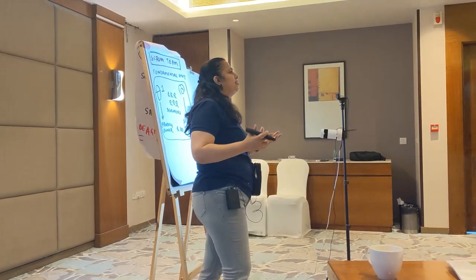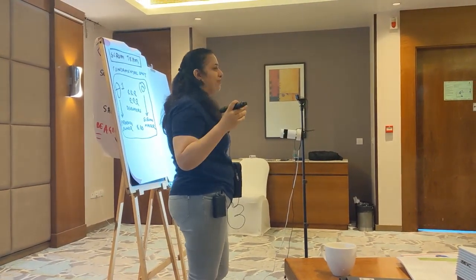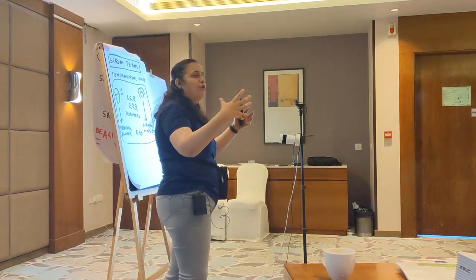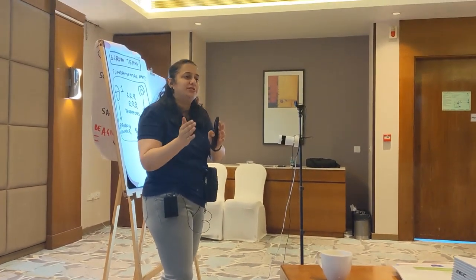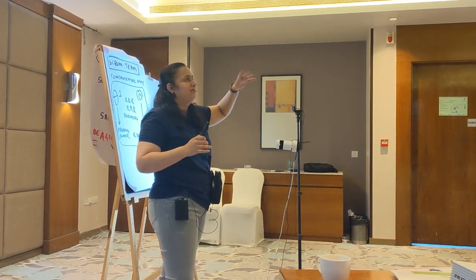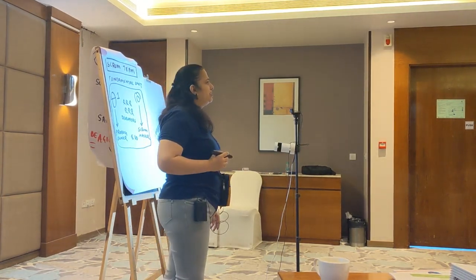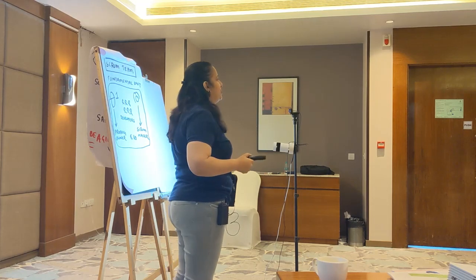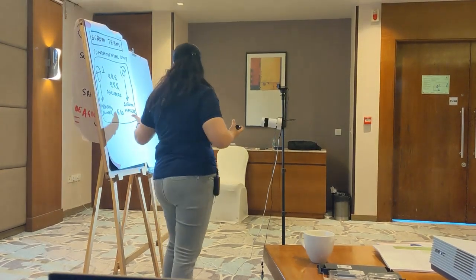Let us think, what happens when there are 30 people within the Scrum team? How many interactions can you have? Multiple. Everybody talking all day. Correct. To solve this problem and have more cohesiveness, it is often more effective to have smaller units. That is why Scrum recommends that Scrum teams are about 10 people. If you have 30, I would recommend dividing them into 3 or 4 teams. We'll talk about the daily Scrum afterwards, but can you imagine a daily Scrum of 15 minutes with a 30-member team? Never. It becomes inefficient. The efficient size is about 10.